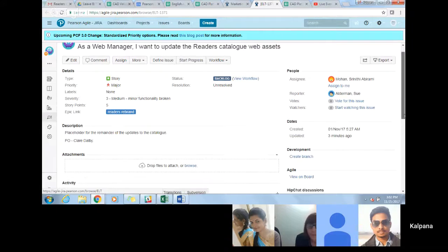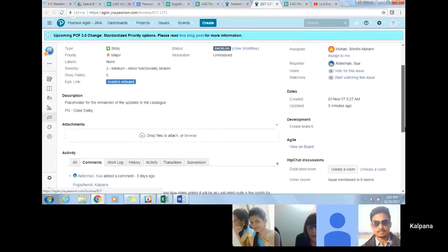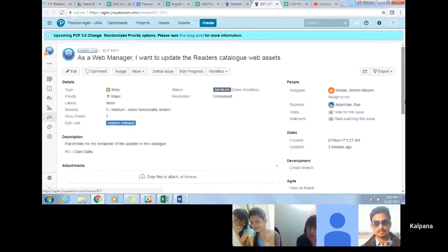In English.com, if we have more than 200 or 300 asset files, we can easily complete them within around 3 to 5 points. But in readers, it's not like this. If we have 40 to 50 titles, the work will definitely be high, so in this case we will take 3 to 5 points. So we have more complexity for doing the titles in readers, and less complexity for doing the asset files in ELT. That is the problem.